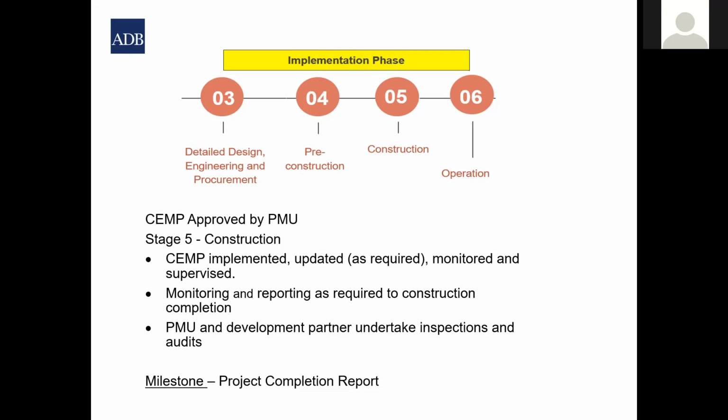Sometimes we can approve the overall CEMP, for example, if the contractor may not have all his site-specific plans prepared right at the very beginning. If the project is a 1 or 2 year project, he may not have thought about his methodology in detail for work down the track.